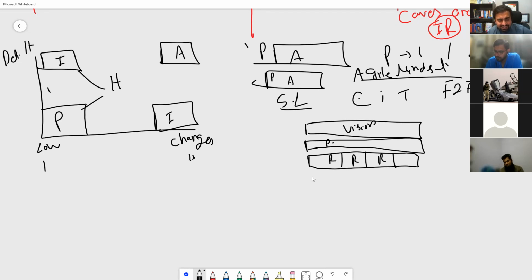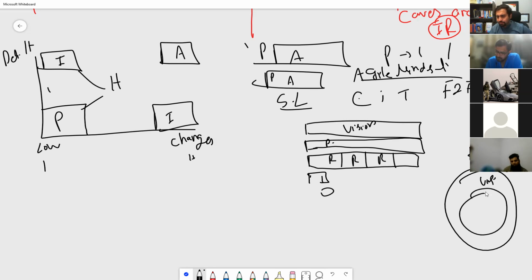Then we make iterations or a sprint plan. Let's say a sprint is 1 to 4 weeks. Let's say 2 weeks, you make a sprint plan, and then you have daily stand-ups. Sprints, then again daily stand-ups. It can be represented by the onion model: vision, a roadmap, release, then iteration, and then you can put the daily stand-up in it. So this is basically how we do planning.